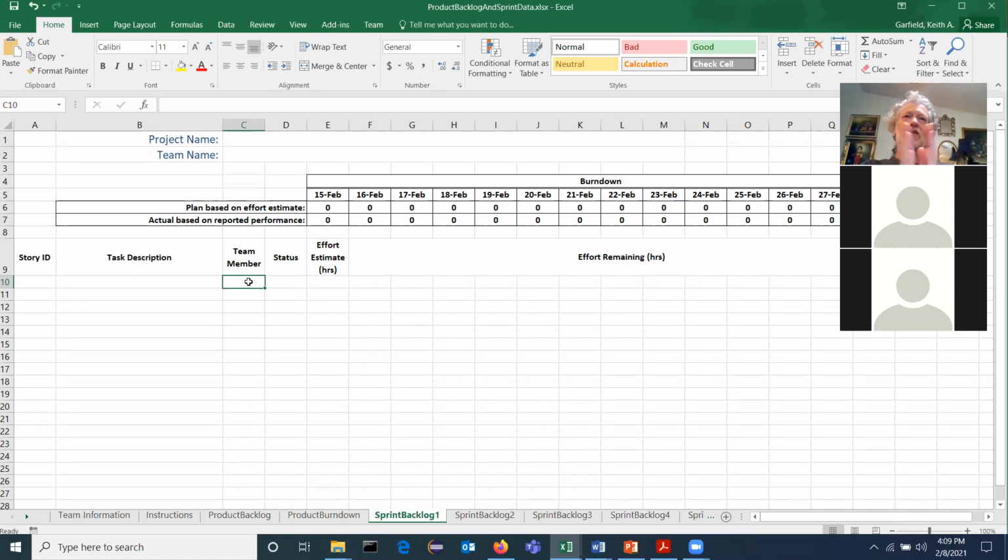If you instead say, okay, we're going to do a sprint, it lasts 2 weeks, here's your job, see you in 2 weeks, there's a really good chance that job isn't going to get done. Because that person's going to be putting it off and putting it off until finally, oh shoot, I don't have time to get it done. But if you say, here's your job, you have 2 weeks to get it done, and we're going to talk to each other every other day, that job will get done.